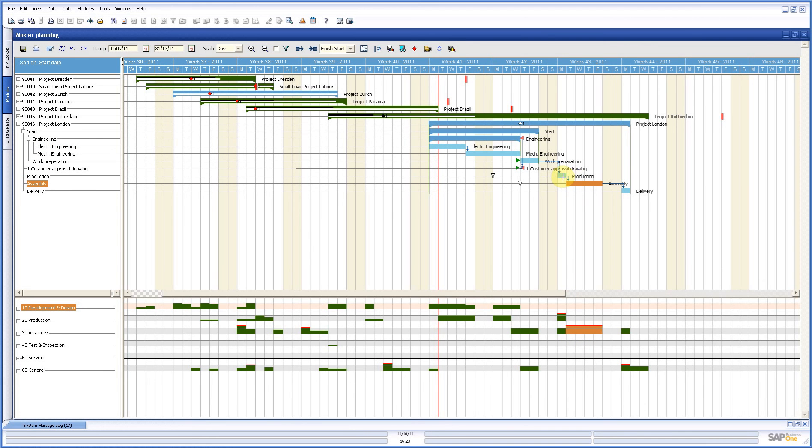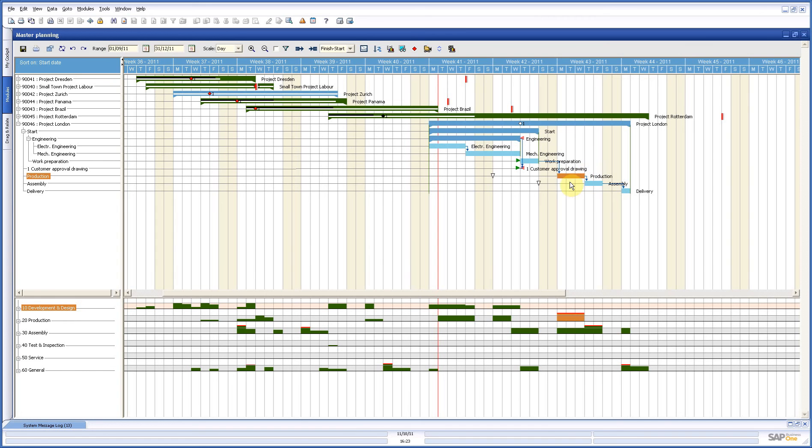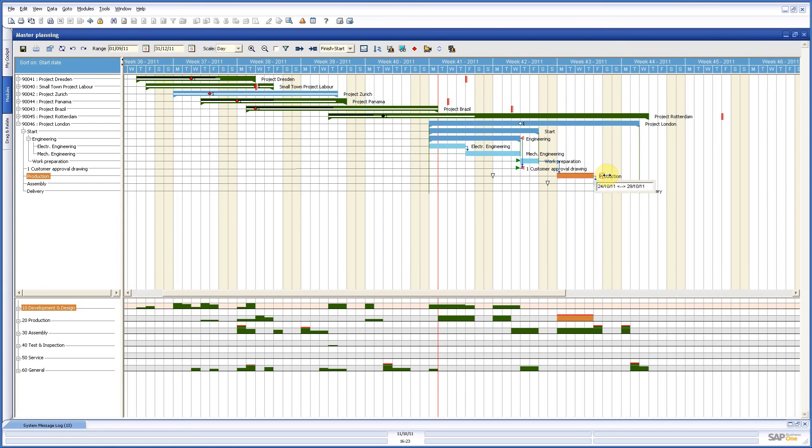First of all, this problem can be solved by just making the lead time longer. So, in this production, we will say, okay, let's put it on one day more. Now, now it fits exactly in one week. Now, how does that come?